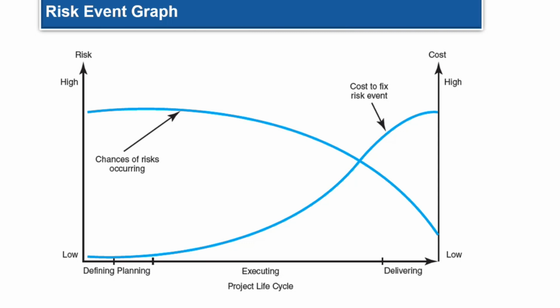So the risk event of a design flaw occurring after a prototype has been made has a greater cost or time impact than if the event occurs in the startup stage. So even though sometimes midway risks are mitigated a little bit, and then risk probability picks up. However, it's very likely at this stage the cost of preventing and correcting a problem is very low, but it picks up. So you can see the curve always goes up. Okay, so that means the cost always goes up.